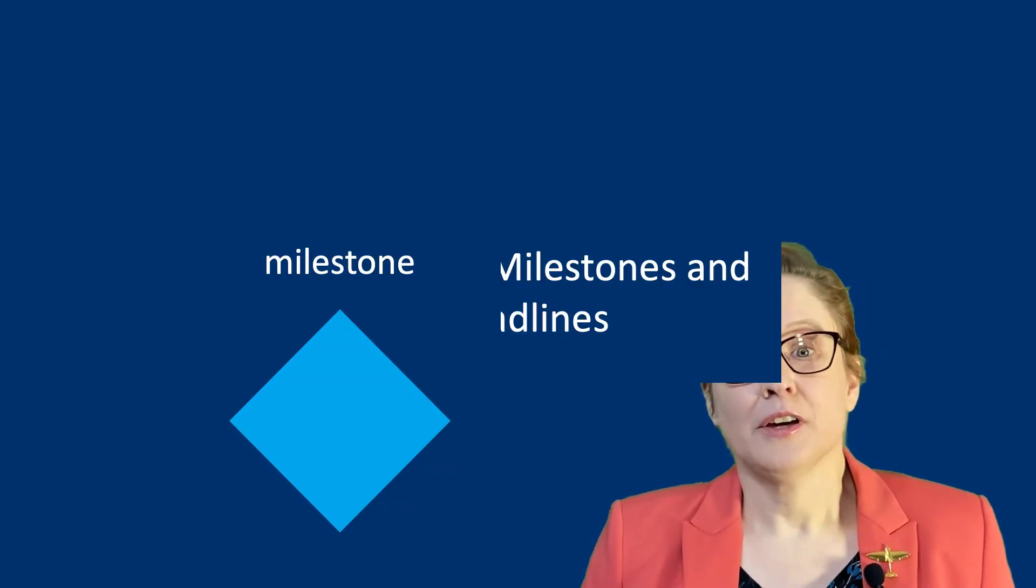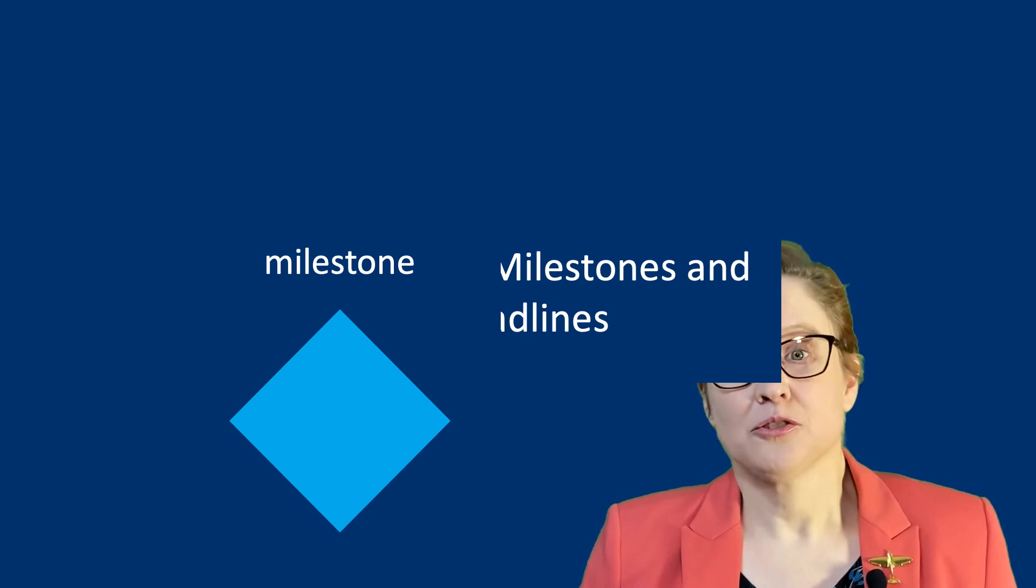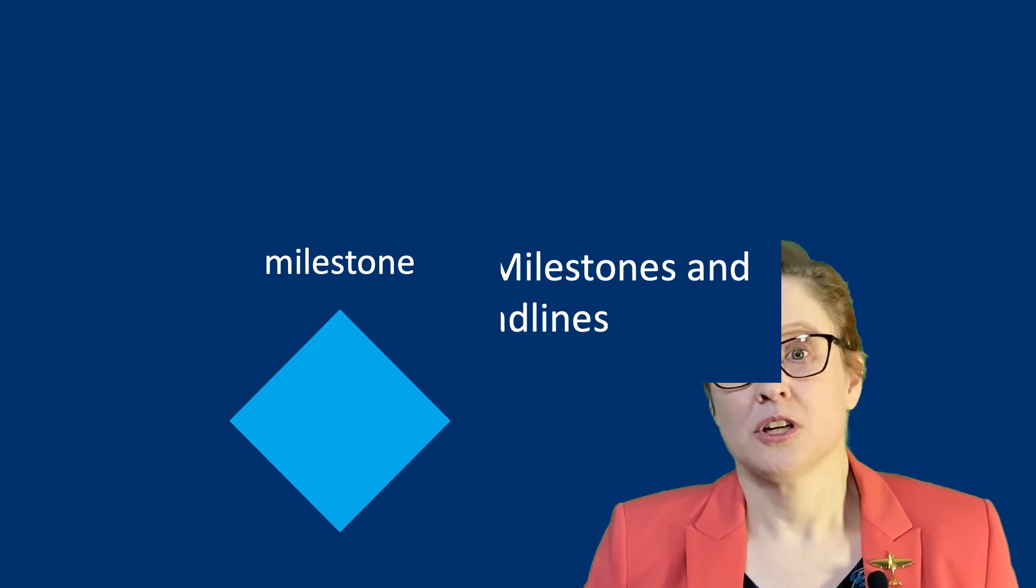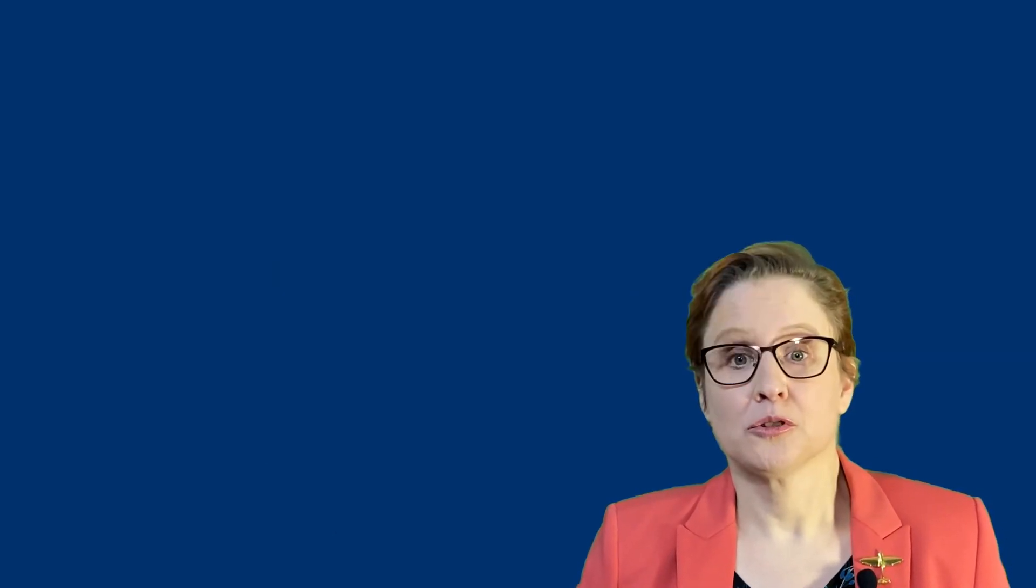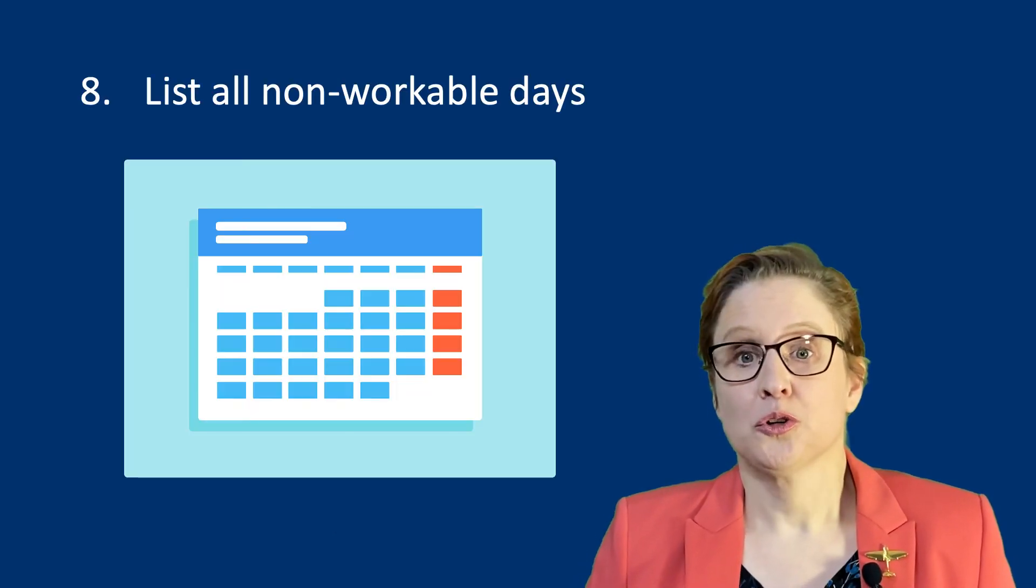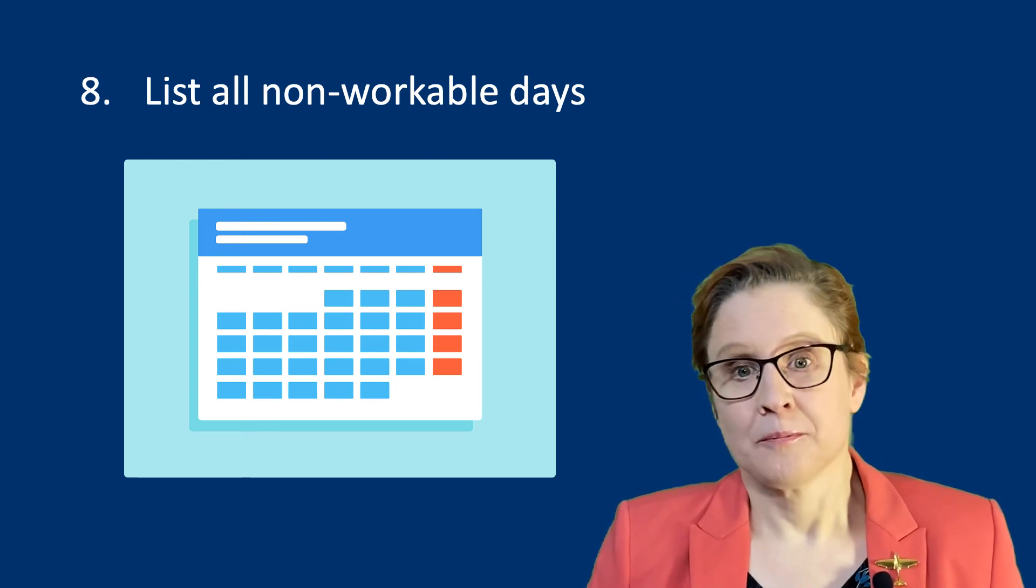Next, identify any major milestones in your research, such as deadlines and review moments. Also list all your non-workable days.